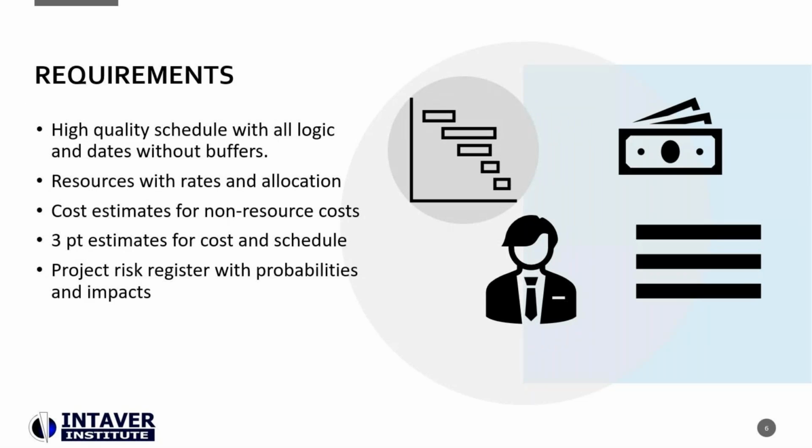So, requirements. At its heart, it is very similar. When you're doing an integrated cost and schedule analysis, you are doing a schedule risk analysis. That means you have to have a high quality schedule, as you would with any schedule risk analysis. You can use the diagnostics tool in RiskyProject to identify issues with the schedule.